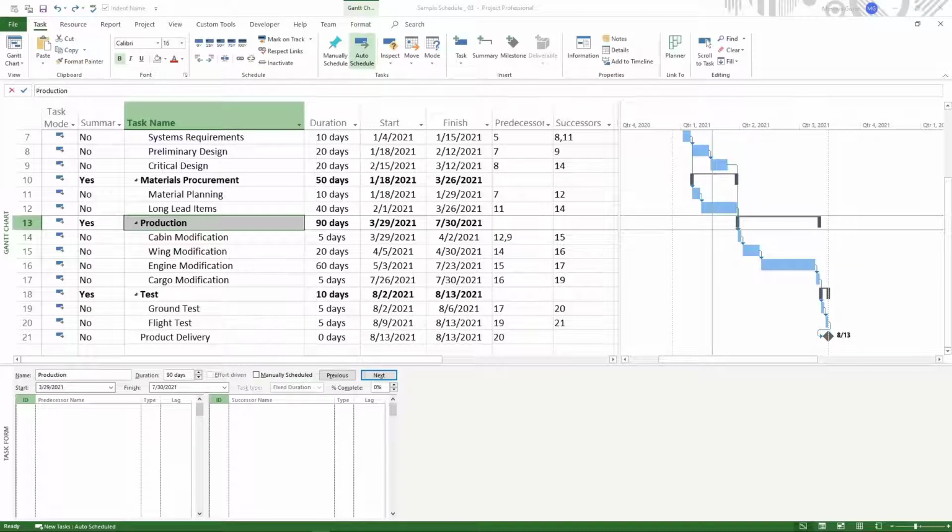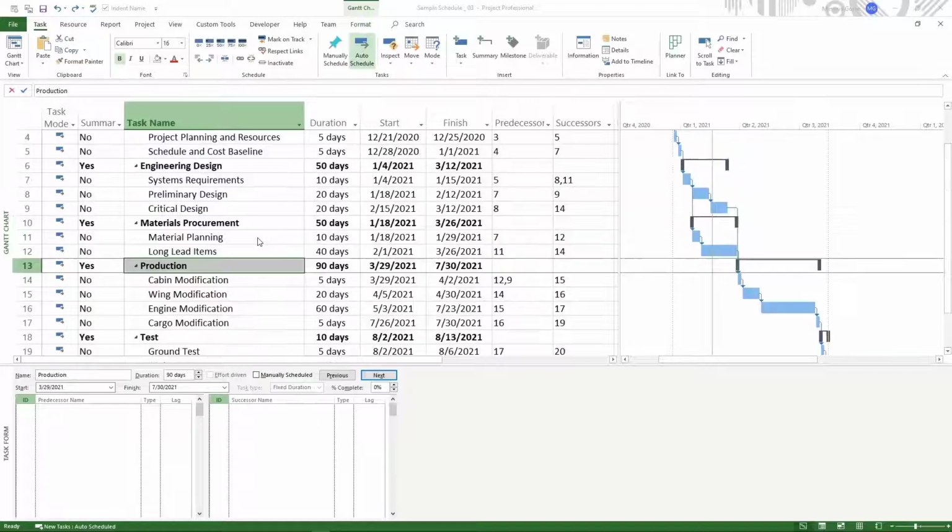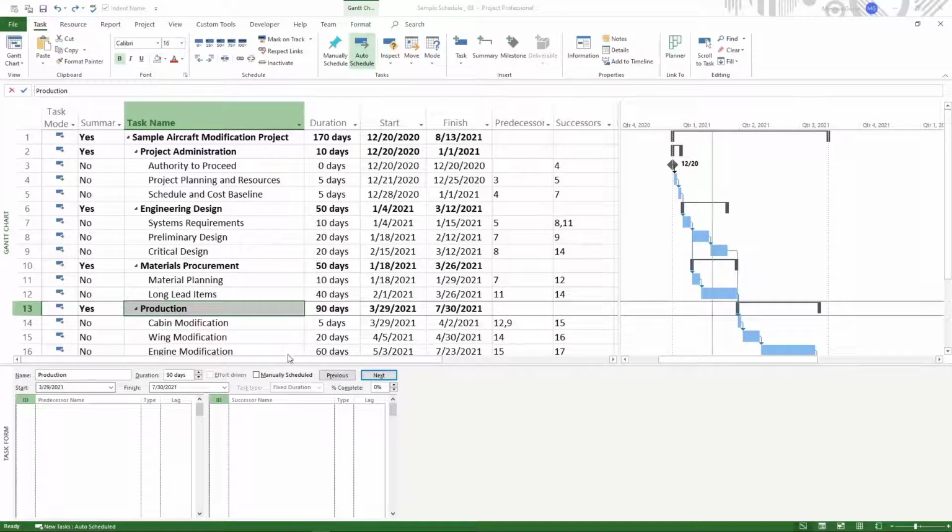But how can you tell in Microsoft Project? Well, since finish to start relationships are what most of your schedule should have, around 90% of your schedule, Microsoft Project doesn't need to show that it is an FS relationship or finish to start relationship. So we're going to look here at the schedule I have open, and you can see that I already have it all here from beginning to end, and I have this task pane open. I'm going to close it for now.